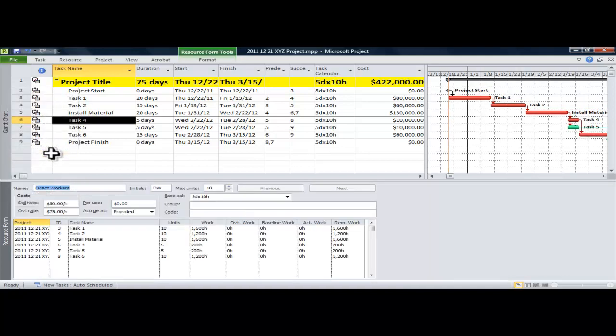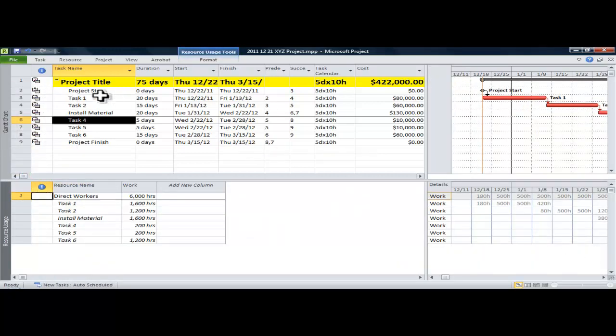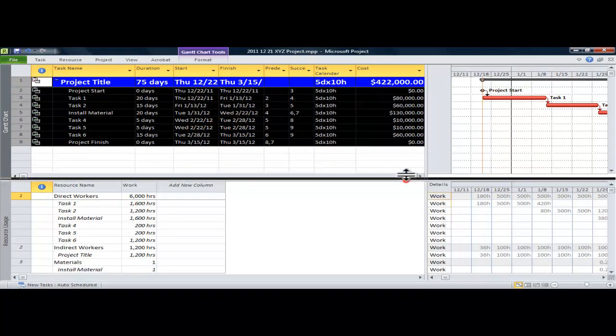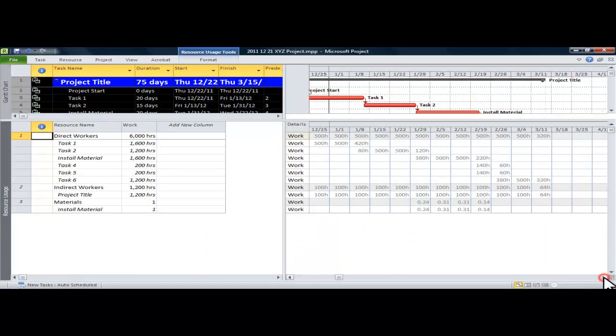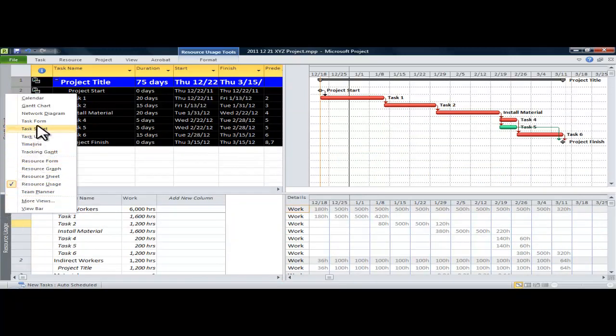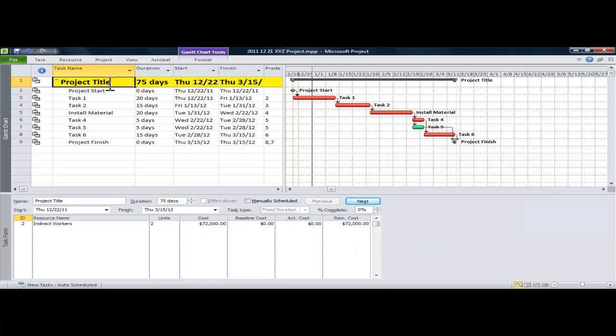bars of these layouts. You can either show a graph at the bottom of the screen or another type of chart that shows man hours per month, or whatever your time scale setting is set to. You can show per week or per day. I find this very useful when putting together progress curves. You can highlight this data, pull up cumulative columns, and transfer it to Excel. You can actually put together some reports that export into Excel really nicely. That's the great thing about Microsoft Project, is it dovetails really nicely with other Microsoft products.